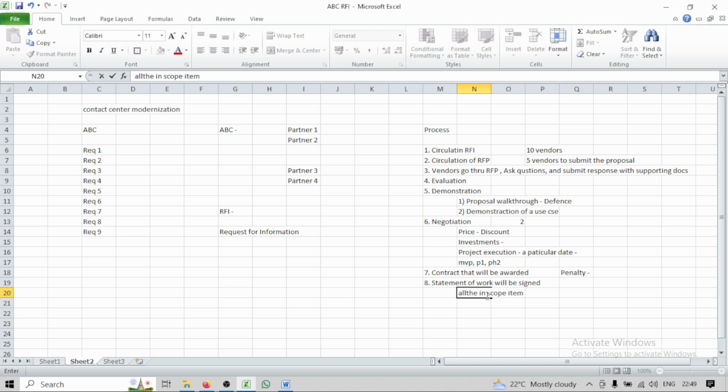Okay, now what is this? Basically whatever is written in the statement of work, that vendor agrees, we will be executing this project with this model, let's say agile model or hybrid model or waterfall model. We will be implementing these features. This will be the RACI matrix. Then this is how we are planning to implement, basically the project execution model, offshore, onshore, things like that. Whatever is written in that statement of work, that becomes the source of truth for project execution.